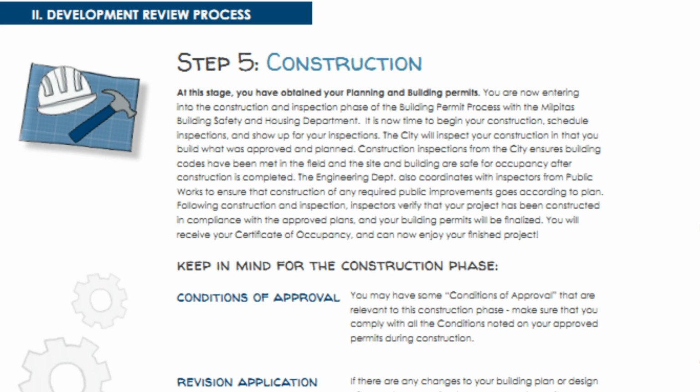Pre-construction meeting. For larger developments and commercial projects, a pre-construction meeting will allow the project team to coordinate with the city to understand how the city will work with the project team during construction and give advice on how to make the inspection process before, during, and after project construction go smoothly. Be prepared to discuss the mandatory requirements for the project, including on- and off-site stormwater pollution prevention plan, traffic control, truck access and routes, and any special requirements for the project.